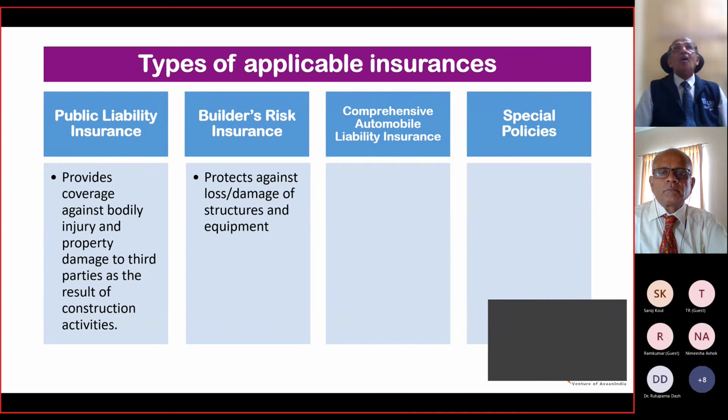The contractor is liable for a certain number of years, for example for road construction or building a bridge. If any damage happens or there is any consequential damage wherein people died, then the liability on the contractor is very high. So all these factors have to be taken into consideration when we talk about liability insurance, which is the risk of operation. Any question in this regard? Are things clear? Please understand, these are all important fundamentals we are talking about.